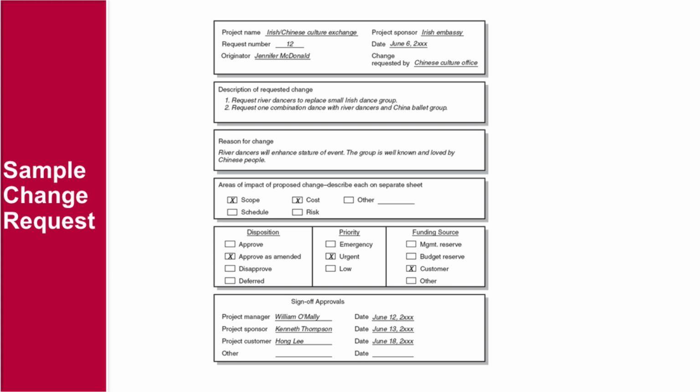Assessing the impact of changes on a project is crucial, as solutions to immediate problems can have unintended adverse effects. For example, self-driving software must be tested to handle various driving scenarios without causing accidents. Changes should be evaluated by experts with relevant knowledge, such as architecture firms for construction projects or software architects for development efforts. Organizations track proposed changes using change request forms and logs.